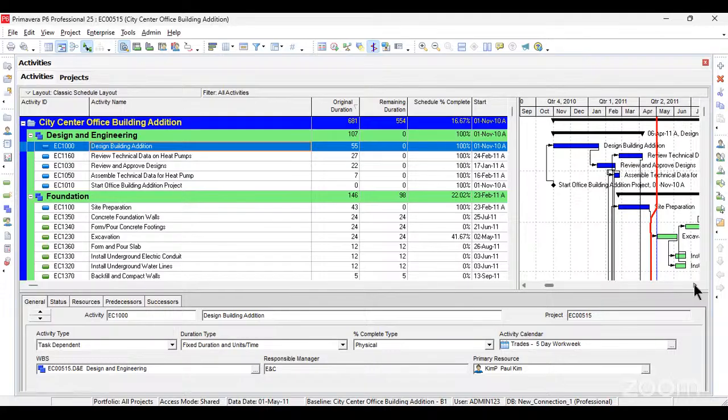The heat pump is supposed to arrive in Lagos State by Friday or by next week Monday, sir. Have we spoken with the OEM? Have we done this? This is what we need to do to make sure that this pump arrives before, because what you really need to do is to make sure that your critical activity, everything happens before the start date, sir.